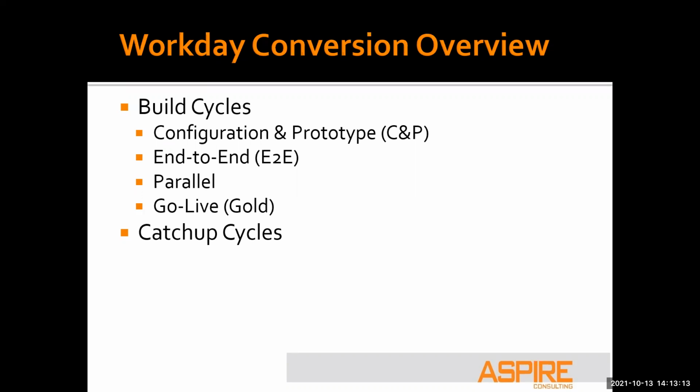But if you have periods where you don't want to wait until the very end to pull all of your data, so maybe a larger conversion effort where you're talking about tens of thousands of employees or hundreds of thousands, who knows, you're going to need a little bit more time than we're shutting off the old system, we're going to pull the data and we're going to load it. You can't do that in one night.